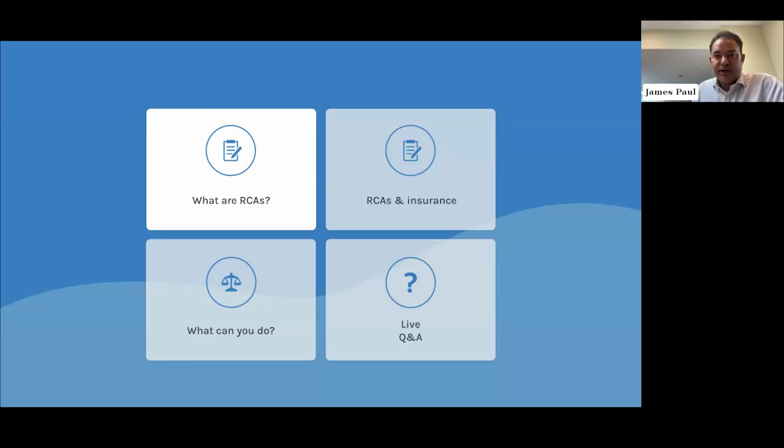Well, assuming it's a full physical assessment in distilled format, with all RCAs, it's basically an area times rate sum. That's all it is. A building has a given area. There are various ways that you can work out the area of a building, but the RICS guidance lays down to surveyors precisely how they should do this. And then we come to the rate part of it, which is the subjective bit, which often produces differences of professional opinion between surveyors.